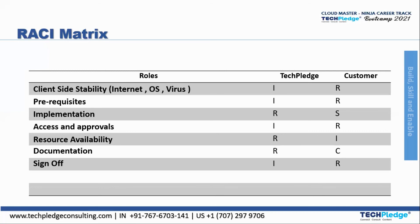For resource availability, before the project plan kicks off, tech place should confirm whether resources are available — responsibility is tech place's and the customer is to be informed. For documentation, the responsibility of tech place is to provide documentation during handover, but the customer needs consultation about it, so consult is the customer's role. For sign-off, tech place is informed but the responsibility is the customer's. This is the RACI matrix, where 'S' also comes into picture representing a supportive role.